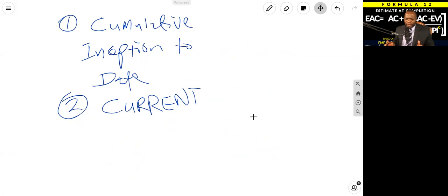Okay. Now, organizations need to define what they mean by current. Typically, we're talking about a month, that month. Now, if you choose to use a different convention to talk about quarter or something peculiar to your fiscal year, you got to define that. But for the most part, cumulative is used to describe inception to date. So January to December would be cumulative, for example, if the project or the particular endeavor started in January, you could say, what is the cumulative earned value? We're talking about inception to date.